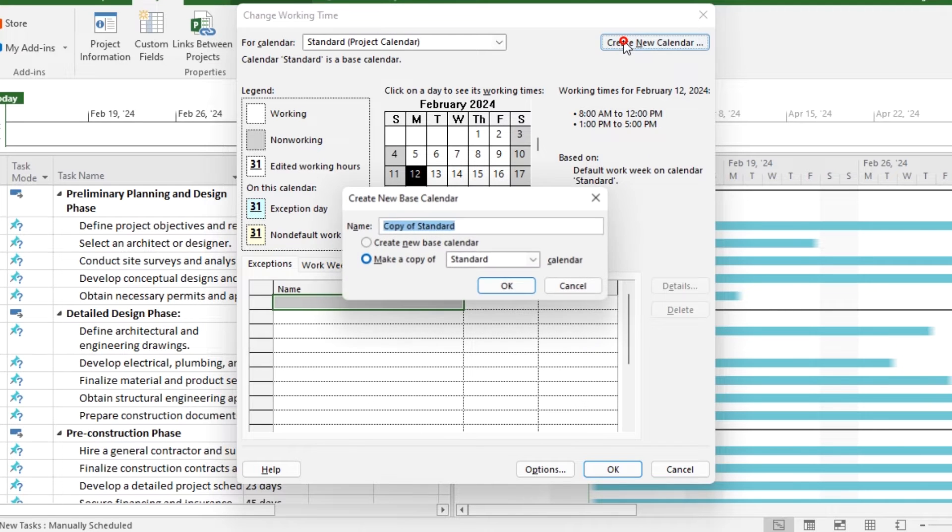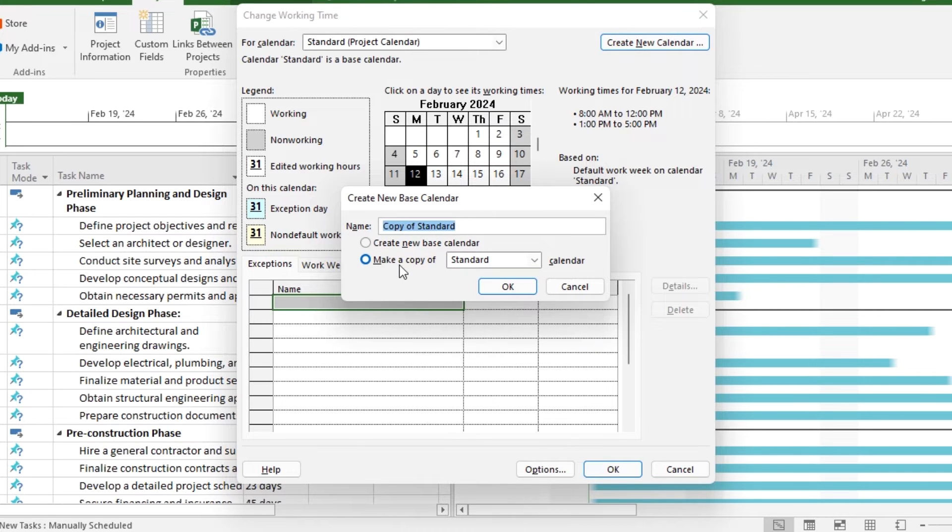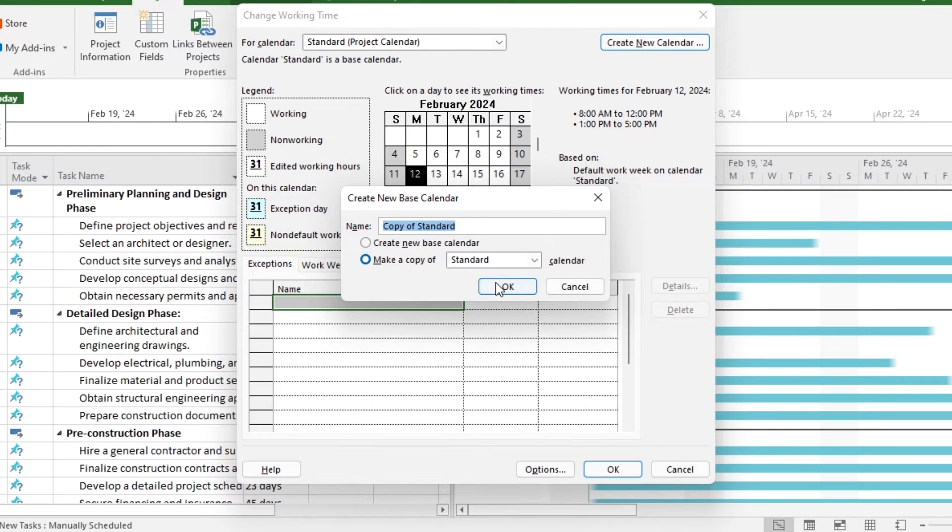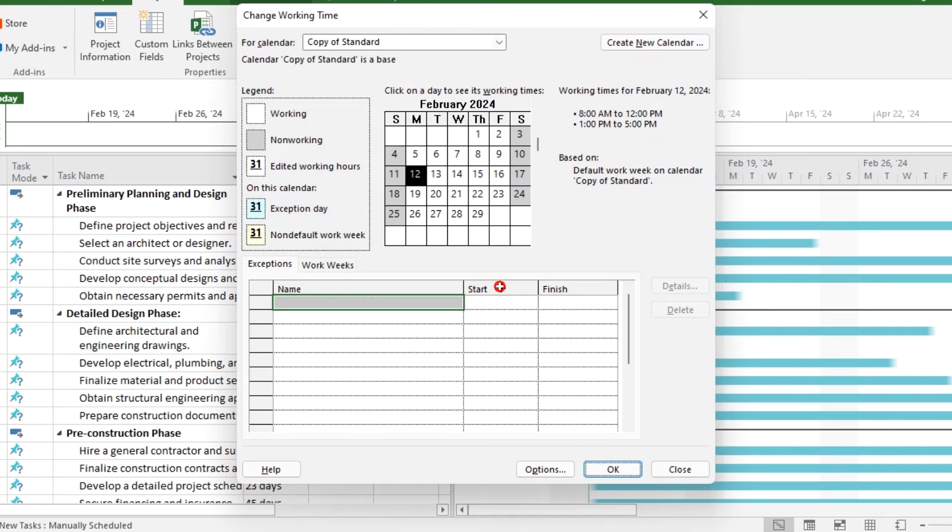Here the default calendar is standard calendar with two days off in a week. So if we need to make a new calendar according to our requirements, we can just make a copy of the standard calendar and can set the working days according to our own requirements.